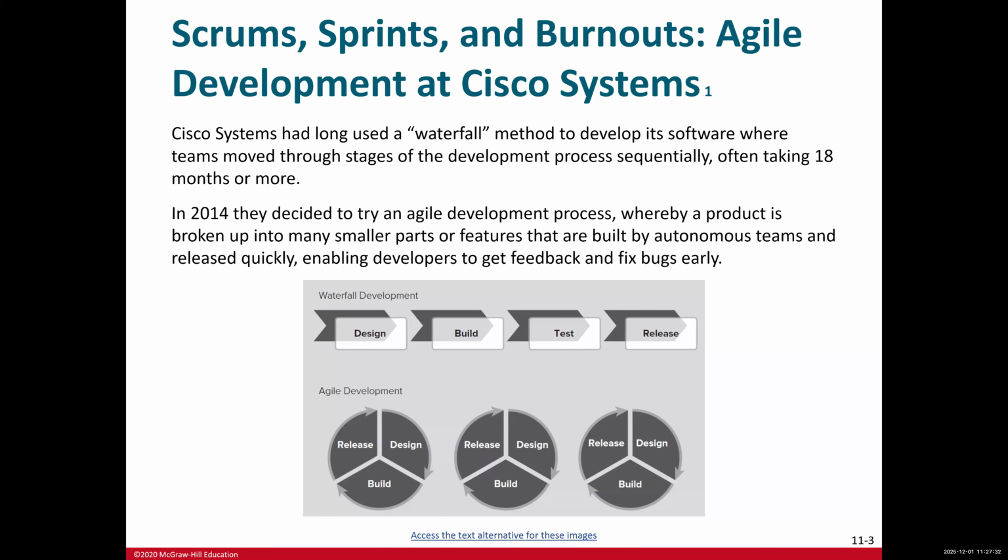This sequential approach caused very little to no overlap or feedback during the process. That's the reason we had long development cycles, right? Because it's so structured, it can take a long time. Usually for any software development, it used to take around 18 months or more to go from the inception phase, or initial idea, to a finished product.